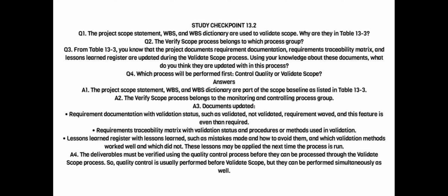Requirement documentation with validation status, such as validated, not validated, requirement waived, and this feature is even then required. Requirements traceability matrix with validation status and procedures or methods used in validation. Lessons learned register with lessons learned, such as mistakes made and how to avoid them, and which validation methods worked well and which did not. These lessons may be applied the next time the process is run.